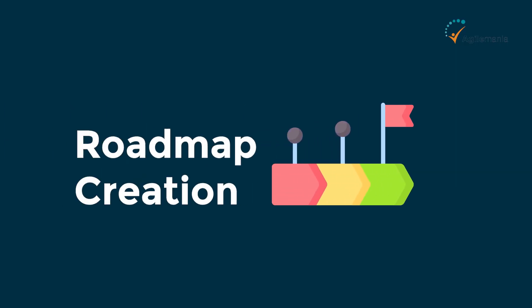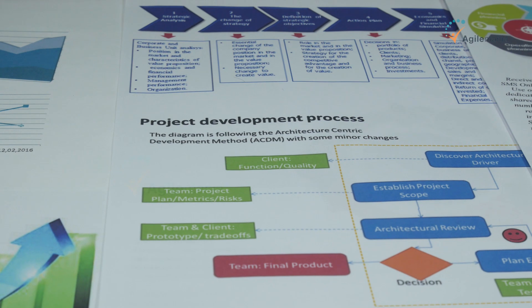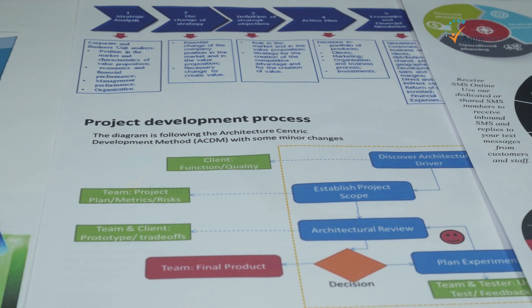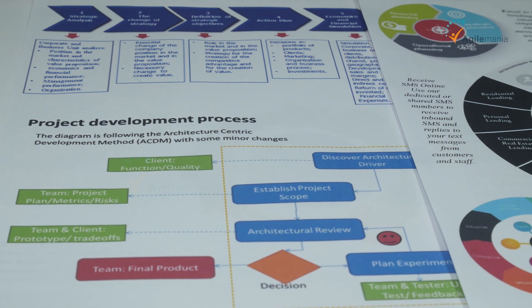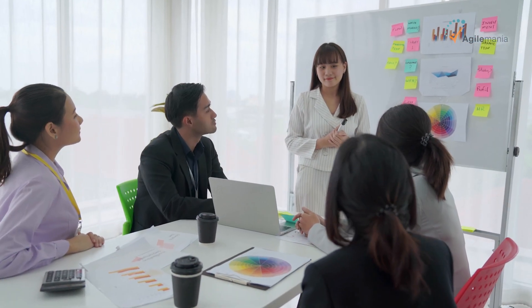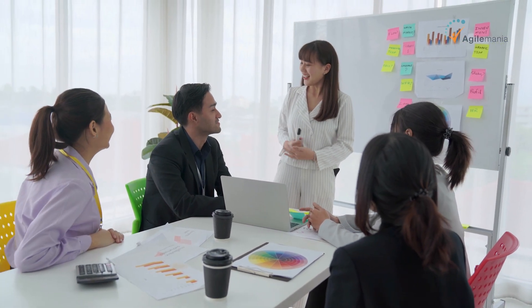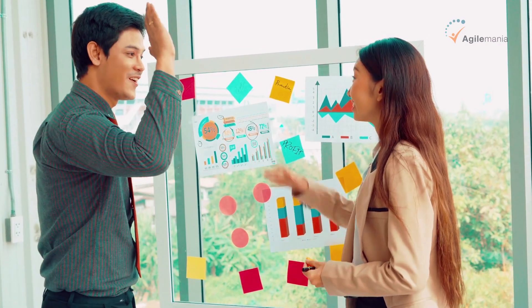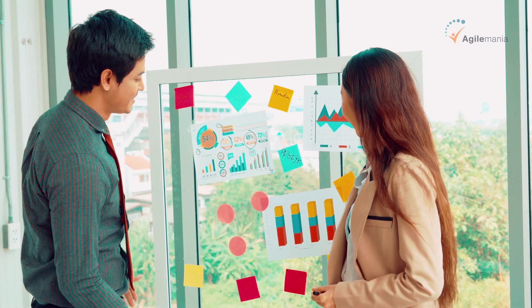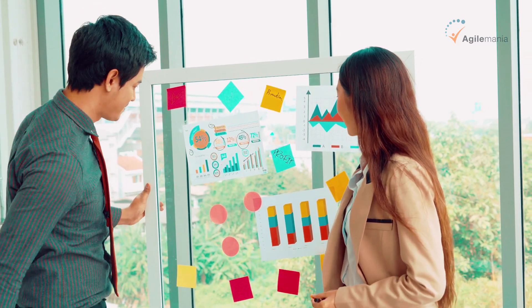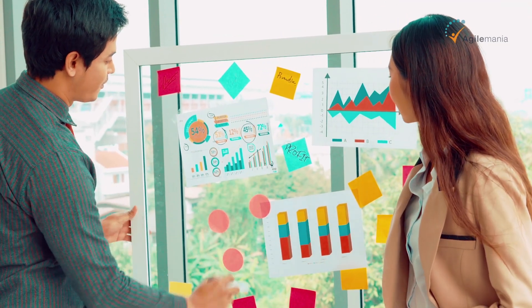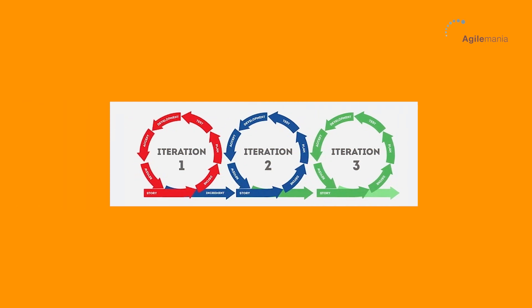After root cause analysis, we move into roadmap creation. The roadmap should have a week-by-week or milestone-based plan. As an agile coach, the plan starts with observation, then mentoring, then coaching and teaching, and finally moves toward more mentoring as the team matures. The plan should be created sprint-wise - defining what the agile coach will be doing in sprint one, then how the role keeps changing.